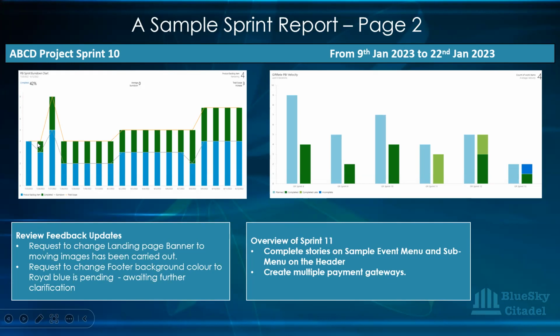So what they committed initially and what you have there was an increase, and then you could see that all through the sprint. Those are the number of days at the bottom here, and over here you have the efforts, or number of stories. This is just talking about the count of work items. And over here you can see the velocity for that team. They're looking at how they've worked over, I think, 6 sprints, over 6 iterations. You can see what they've done.